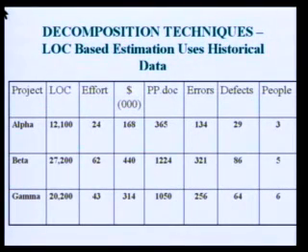So it means that for each 20 lines of code you have written 1 page of documentation. The most important thing is 20 lines of code is not even one screen, because in one screen you will be having 24 lines. So for 20 lines you are writing 1 page of documentation, which means it is definitely huge documentation. So that is the estimate for that particular project.